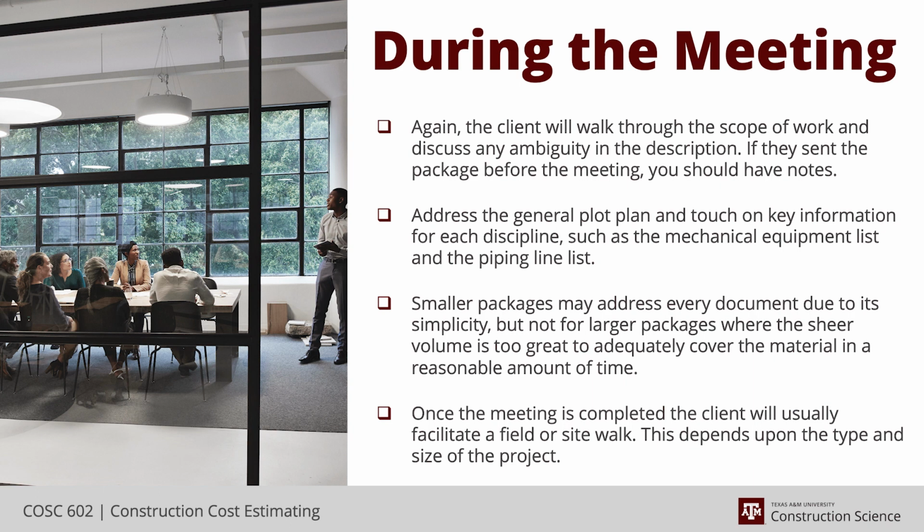When you think about the heat that furnace is putting off, and the fact that you're in Houston in the middle of the summer and it's already 95 to 100, you have to start taking in special considerations of, okay, now we have to have cool down stations for all the craft, things of that nature. So that's the type of things we're looking for as we're walking the sites.